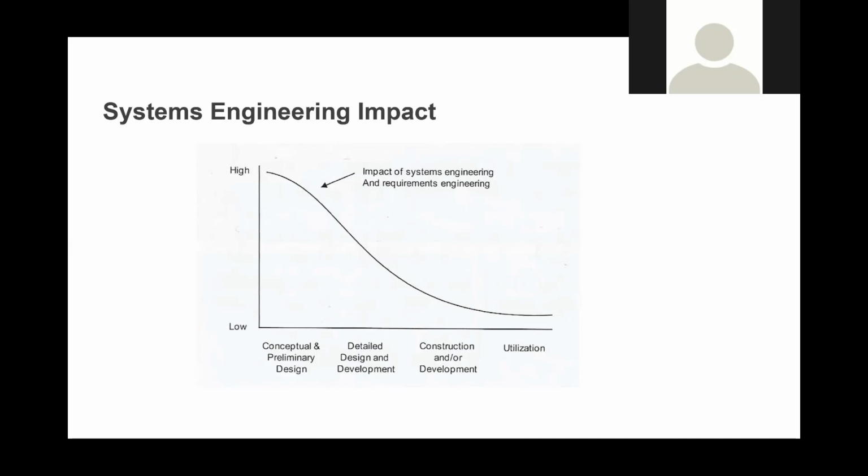And you realize that now you have to go back and redesign it because the design doesn't meet the intent, because it's not a clear requirement. It's not providing precise information about what you need to deliver. And hence the basic thing that systems engineers want to portray is that the upfront cost is more, but you can save millions of dollars later on because you won't need to do rework.